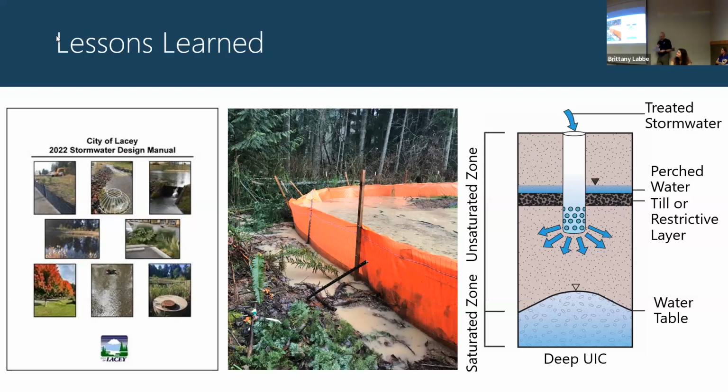And then for the DPICs, again, it's because we've had several projects that proposed them before we had any standards in place. And so we learned some lessons there. The big one is if a project site doesn't have adequate subsurface characterization before they get approval, then you might end up with unexpected issues later, such as legacy contamination.